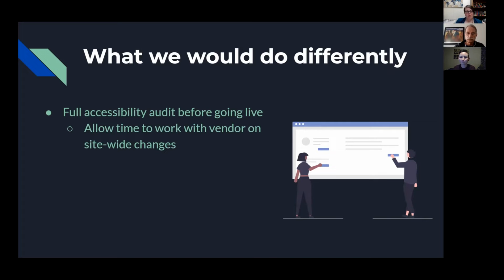Charles mentioned this, that there were some things that we wanted to do to change a couple of templates, but we waited too long and then we were going to get charged extra. So if we had done that earlier, we might have been able to avoid that. It would have been good for us to do more face-to-face meetings for feedback, getting feedback from Drox, as well as just the people that we had testing our website for usability.